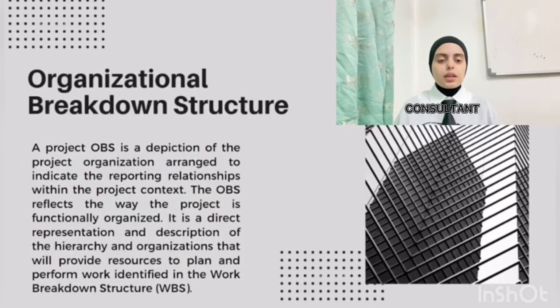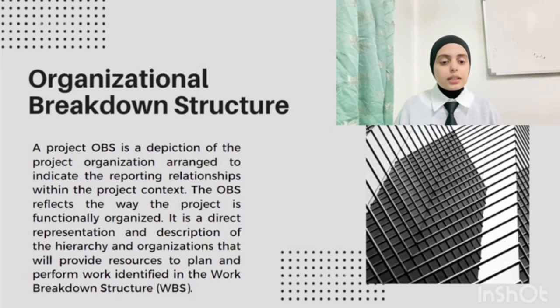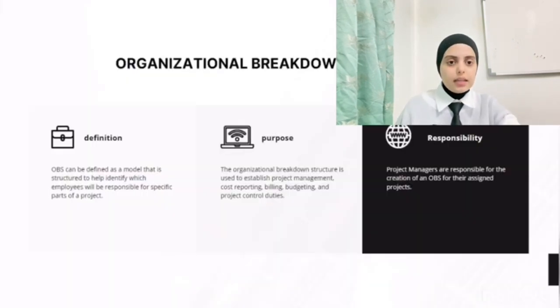My name is Minar Hussein, and today I will tell you about OBS. A project OBS is the description of the project organization arranged to indicate the reporting relationships within the project context. The OBS reflects the way the project is functionally organized. It is a direct description of the organization that will provide resources to plan and perform work divided in the work breakdown structure.